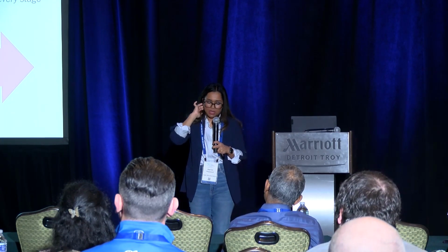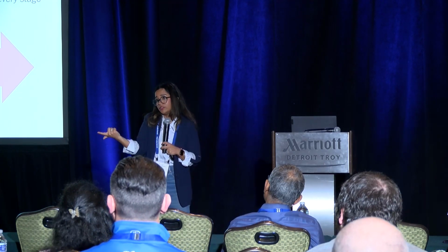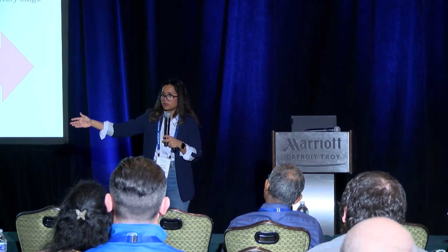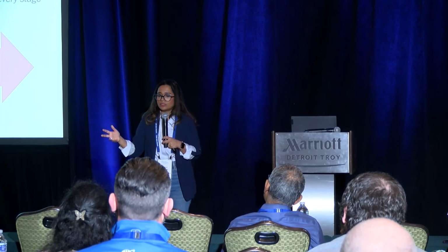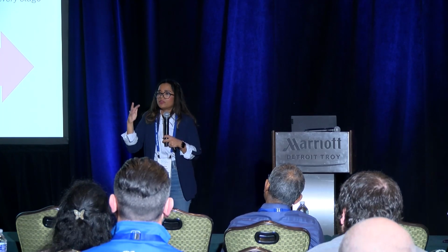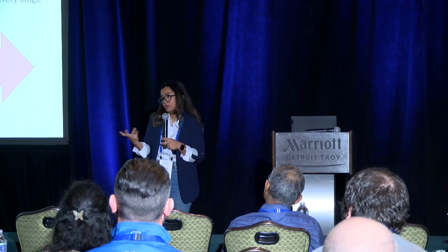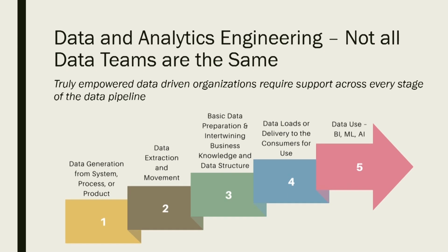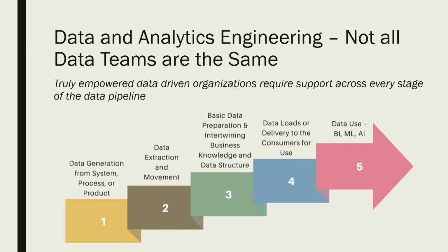So with contracts, the 3 things that really worked well for us were contracts, handoffs, like I was talking about, and triages. So if there's a problem, there's a small amount of people that you need to triage. So here are my teams. This is the contract between the teams. This is how we will triage. And that's a one-pager, like one sheet of page that everybody follows through, which was really important and very easy for us to follow. So yeah, not all teams are the same, but just understanding those three things helped us really, really well.